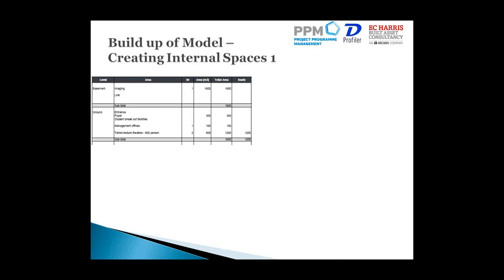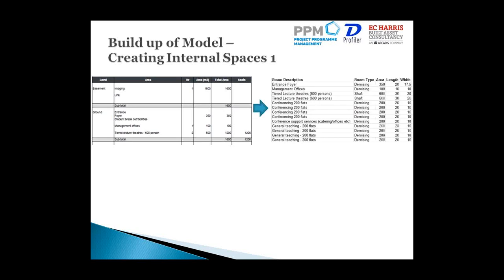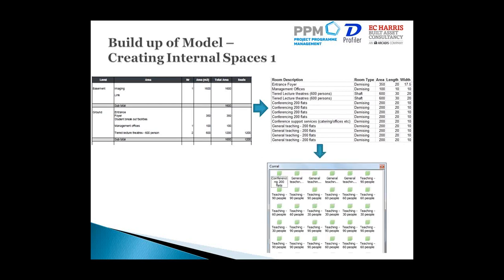After creating the basic box, we looked at internal spaces. From the feasibility, we had a basic list of accommodation — areas and seat numbers, being a higher education facility. We took that into Excel, worked out dimensions for the spaces, then imported it into the profiler into the corral, which gives you 3D images of all the rooms you specified. This was very easy even for a cost manager — the process was literally an hour or so to go from an initial schedule to having 3D models of all the different room types.